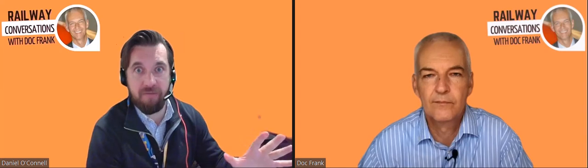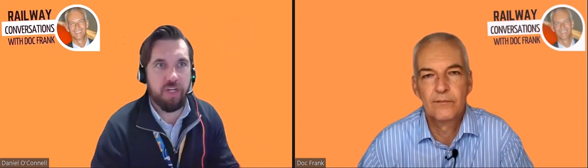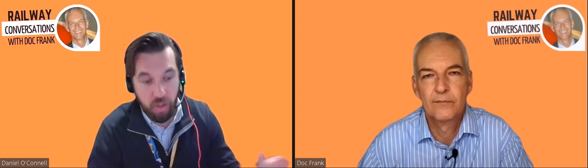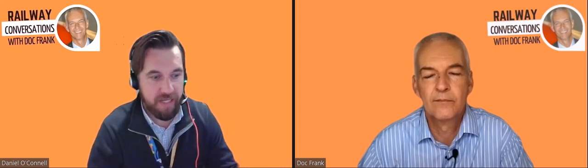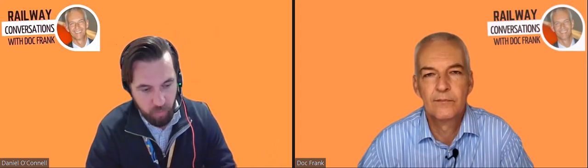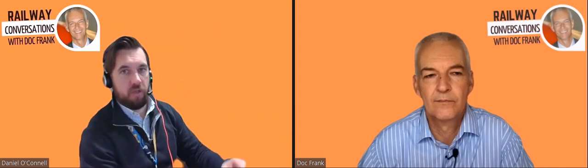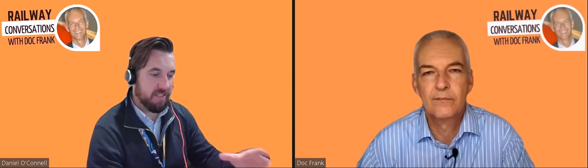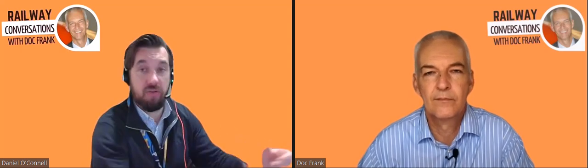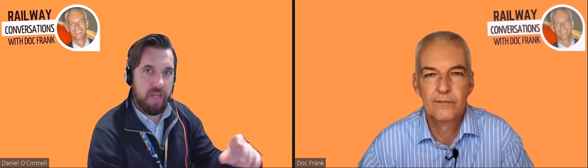Yeah, that's a big step for us. So these first tranche of testings are slow speed activities where you're not actually utilising the settling as a protection function or safe separation. You're demonstrating it with alternative methods. But then you get to a point where you want to run the train at line speed, but you haven't tested the infrastructure. So there's always that trade-off between whoever's doing the build and obviously the settling entity to say, right, now we can run the train at line speed, but we're validating the infrastructure at speed as well. So it's always quite an interesting point from that element.